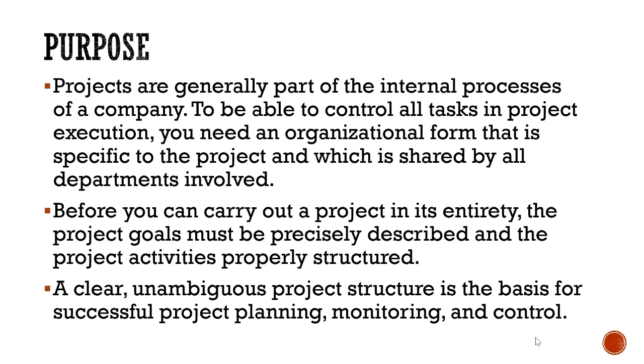Whether it is a purchase requisition or a purchase order, at the time of account assignment, when we select the account assignment category as project, you will get a field called WBS element, and there you have to provide the WBS element, so that the cost of the purchase order will be recorded against the WBS element. So this is a scenario where project systems is linked with the supply chain, or we can say that department.